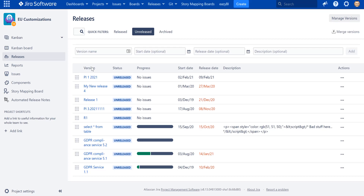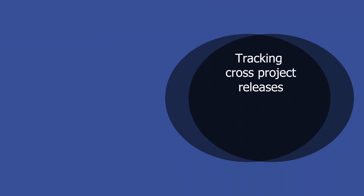This was the first limitation that pushed us to create a release management application. Another limitation we saw was having only two statuses for versions — released and unreleased — which is not sufficient. Most teams, especially in regulated businesses, require a more complicated workflow with defined steps and permissions assigned to each step.